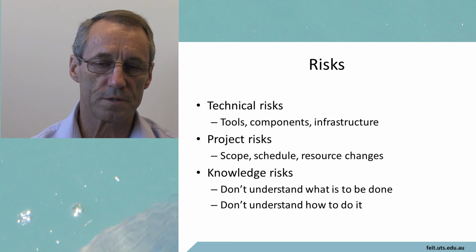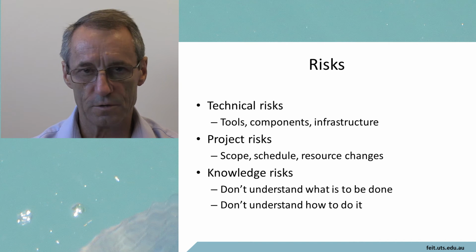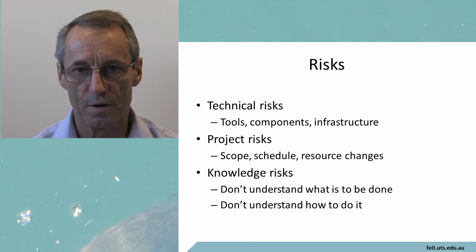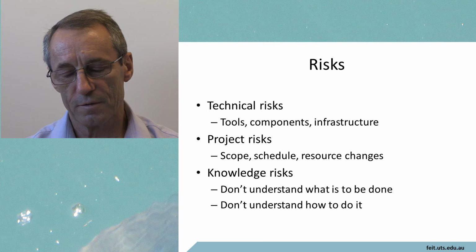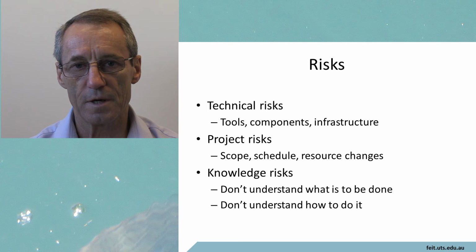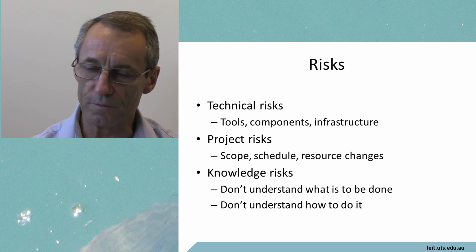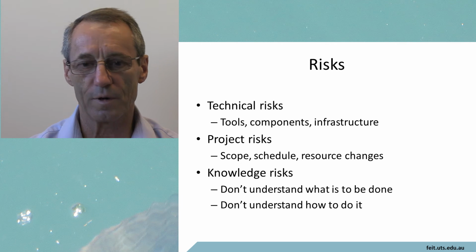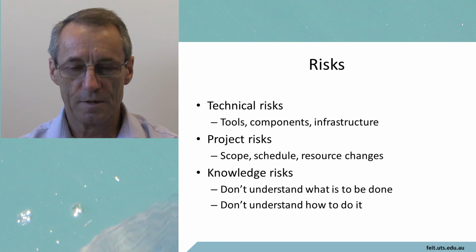There are project risks, scope changes, schedule changes, resource changes. Invariably in commercial projects, the scope will change because people will put in new requirements and the delivery date will change. And most of the time it's bought in. It's seldom that you get more time than you thought you were going to have.